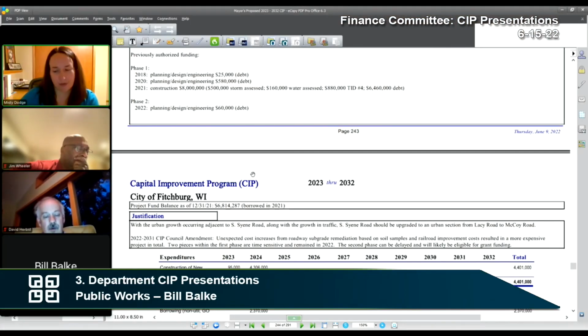Yeah, so there is the half a mile rule, but the first underlying requirement is that the road cost would have to benefit the properties within the new TID boundaries. So one, the TID hasn't been created yet, so it's hard to say that a road that we're doing now is needed to do the TID that we haven't created yet. But then also only the portion that would be because of that TID would be eligible as a TID cost.